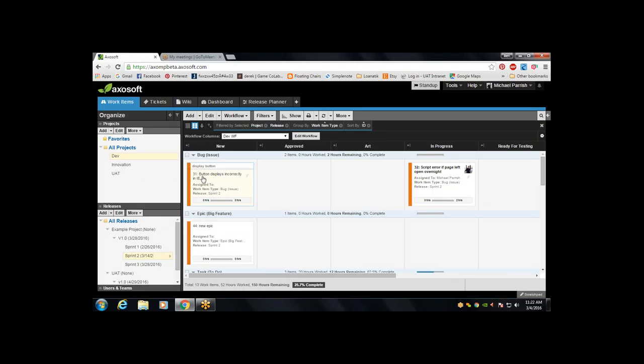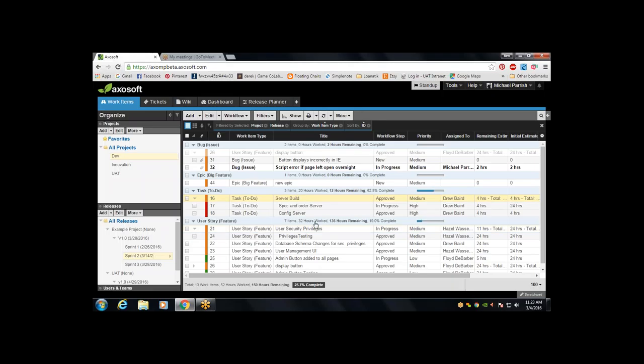So actually, we can create the parent user story as essentially just the starting point, break it down into all of its functional work, and assign that work out to the team. All that work's still going into the sprint because each of those have estimates. The estimate values, by the way, roll up to the parent. So if I've got two estimate values for these two, it rolls into the parent user story. So I still see at the parent level how much effort is necessary to accomplish it, but it's representative of all of the subtasks that were created for it. So again, if it's something that you're just going to knock out yourself, you probably just need a user story.